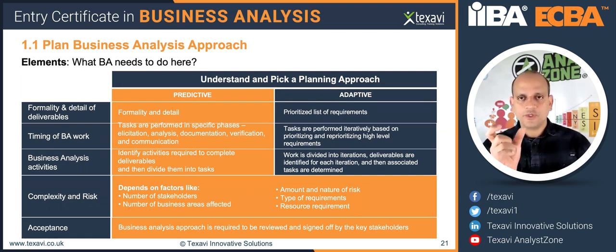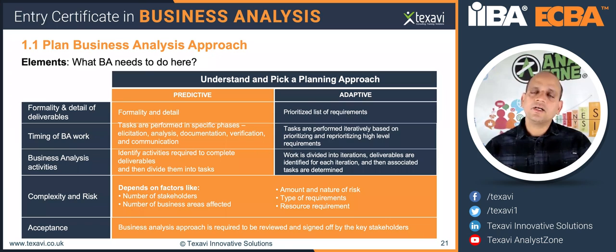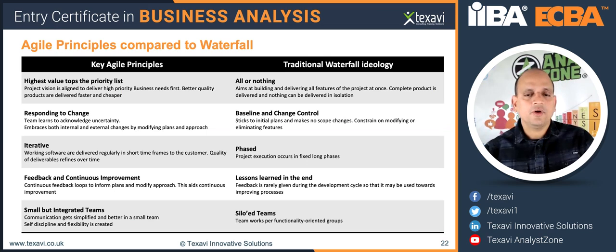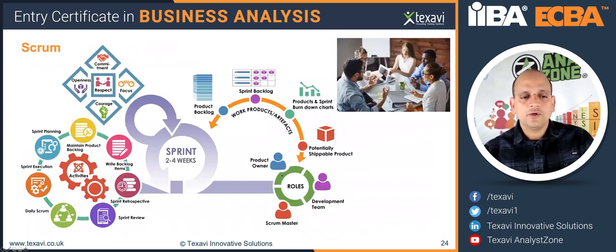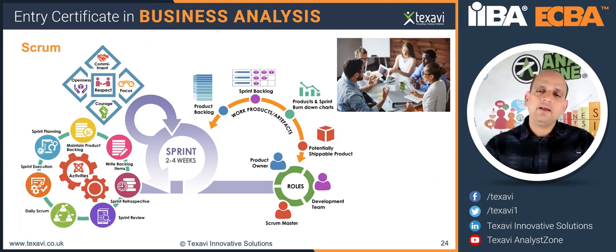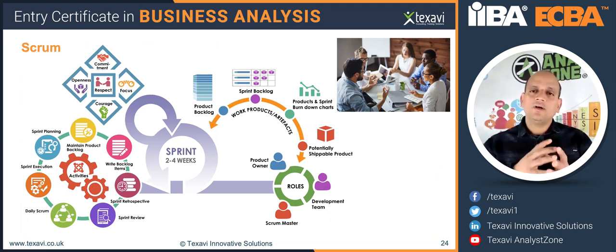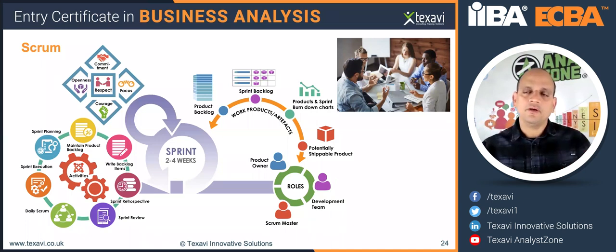Now we've got user stories, which are short ones. You've got acceptance criteria, the Gherkin statements, given when then, and you've got these daily stand-ups. You've got the feedback with the customer. Previously we couldn't really get in touch with the customers so easily. Now we've got sprint reviews, product demos that you're going to show to the customer at least at the end of the sprint, which is 2 weeks or 3 weeks. So you're getting the feedback from the customers early, and then as BA, you would update your backlog based on the feedback coming in from the customers, right?